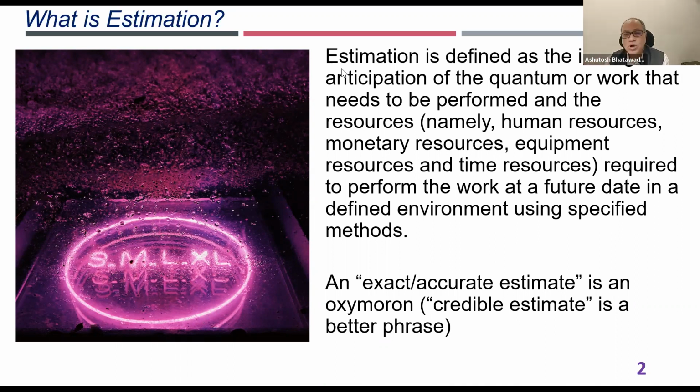We need people who are going to do the job to do the estimate, and they should be supplying the numbers rather than someone else on behalf of those people, right? So a credible estimate is a better phrase. One of the key learnings which I want all of you to take is, moving forward, try to give estimates which are credible. So a credible estimate, in the example of me telling my wife, would be that,